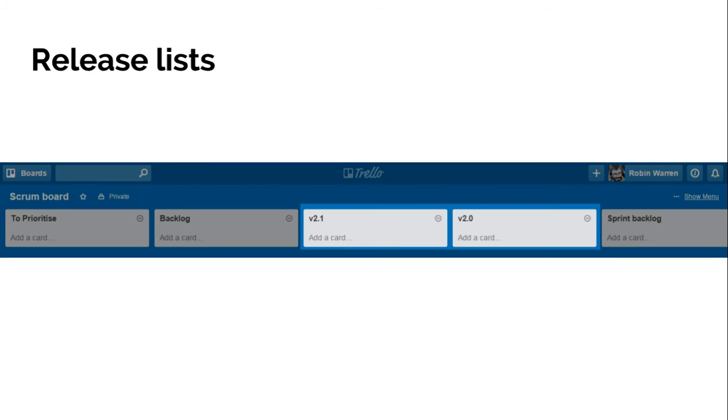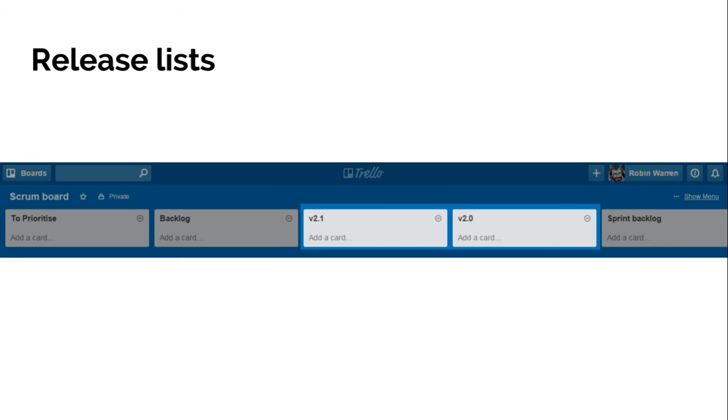Up next would probably be release lists. So here we've got like a version 2 or a version 2.1. If you're not continuously deploying, or even if you are, but you want to track progress towards some notional grouping of work, you can have lists just labeled after those releases. Obviously move things from the backlog into there. Devs can pull from the latest one when they're sprint planning, and you can reprioritize cards in between them.